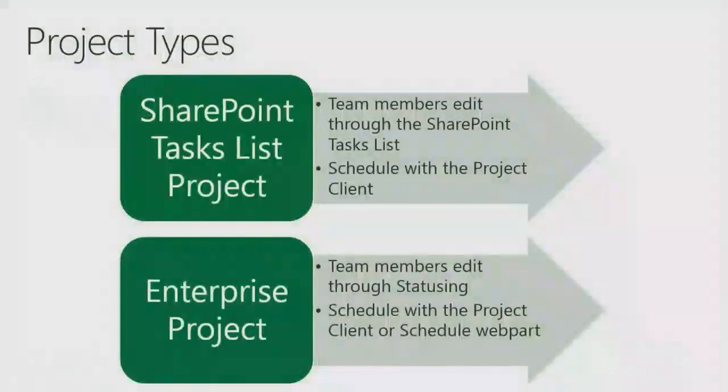Another thing I wanted to cover was we added some new project types in Project 2013. And this, again, affects your decision around if you want to get the full project client for your project managers. Sorry. So in previous versions of Project Server, we only had projects in the enterprise project category. So basically, team members could only edit them by going through statusing. Project managers would edit them by checking them out, either in Schedule Web Part or Project Client making their updates. And then they'd have to approve anything coming from a team member. You could automate the approvals process if you wanted, but it had to go through some kind of approval.